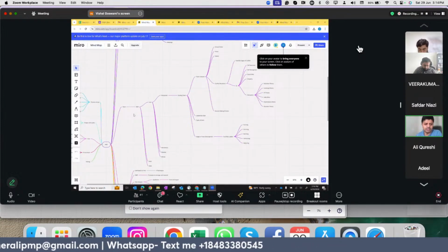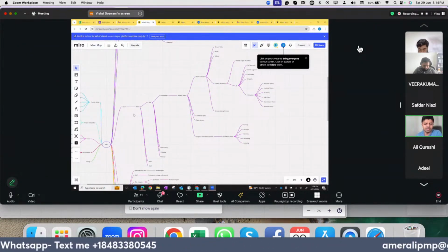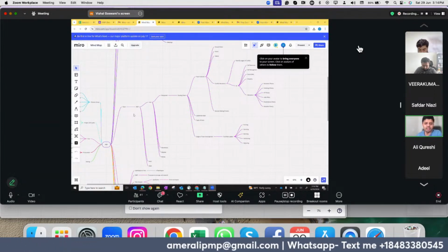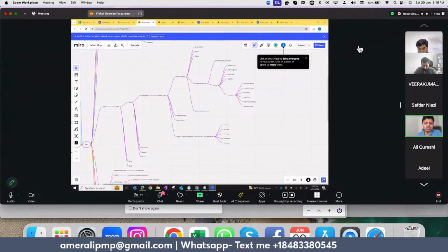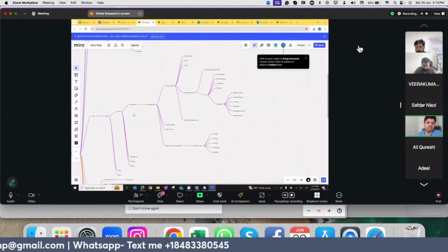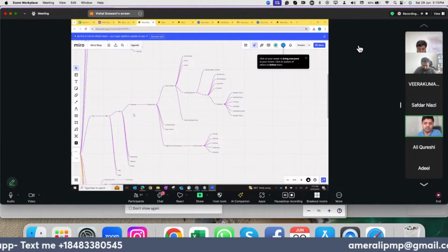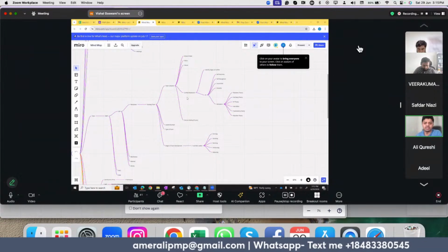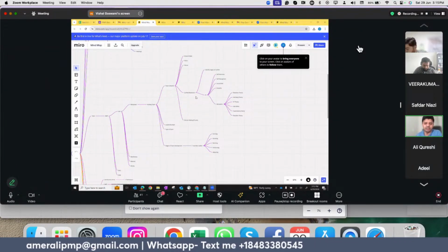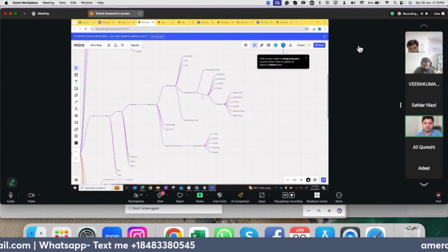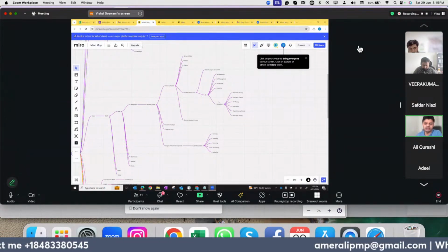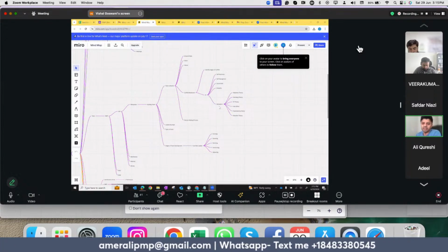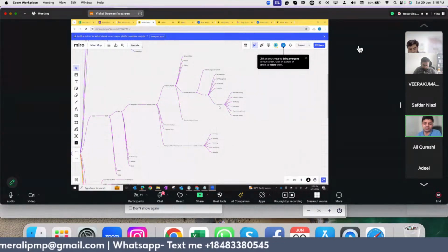Then the next process is teams, where we create the resource management plan. There are 4 M's to it: manpower, machinery, material, and money. Within manpower, we build a team. We build a team charter, which is based on ground rules, vision, values, conflict resolution, and decision making. In conflict resolution, we identify different stages of conflict. There are different emotional intelligence levels: self-awareness, self-management, social skills, empathy, and motivation. In motivation, we have different theories: Maslow's theory, Herzberg's theory, XY theory, halo effect, expectancy theory, and McClelland's theory.